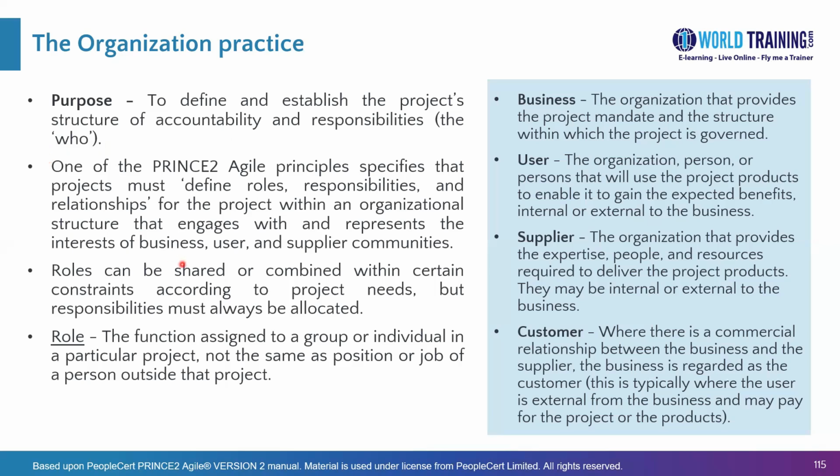Now, it's possible that some of the roles may not be mapped as they are in a real project, but all the responsibilities of all the roles need to be assigned in a PRINCE2 Agile project. What that also means is that one individual may take on multiple roles while they may have a specific designation in their own working environment.